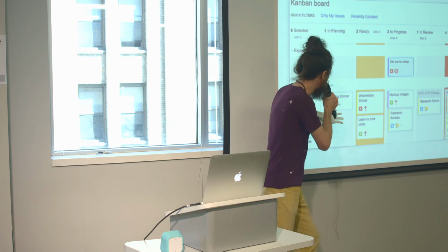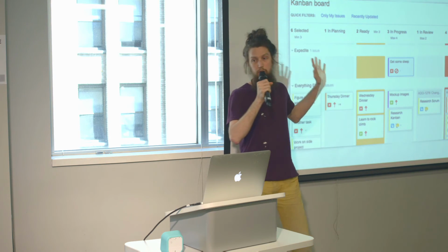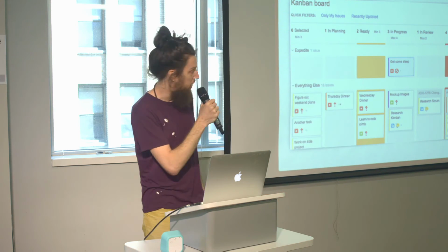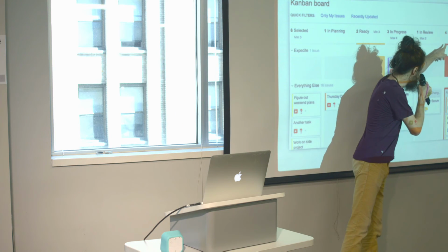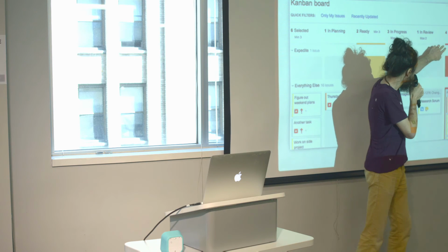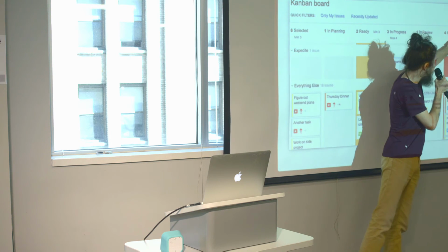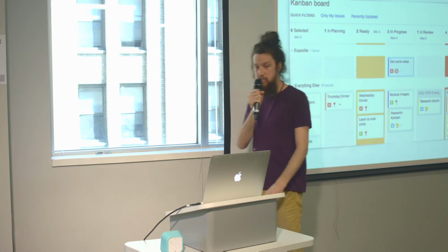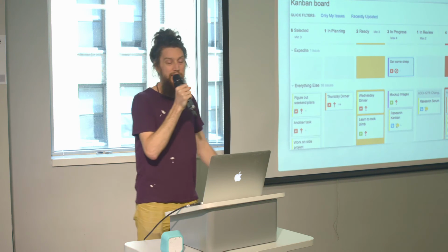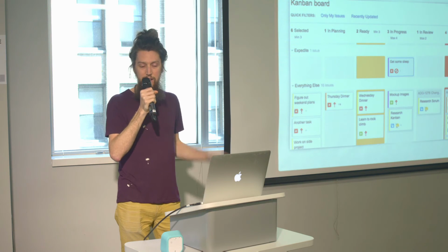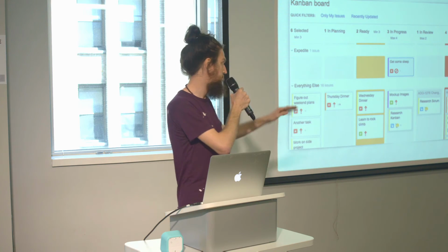Once we're done with that, it moves into ready, and then it's ready for an engineer to pick up and run with it. A couple other interesting things. Just looking at this, you can see that the in QA is red. We have 4 in QA, and a max of 2 is set. So this tells the team immediately that, hey, we should get QAing some of these stories. They're basically done. Let's QA them, get them in deploy, and get them out.